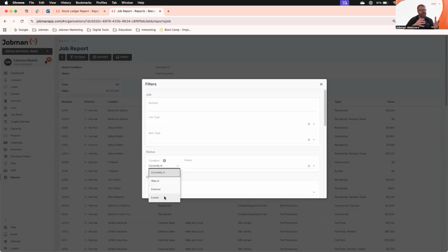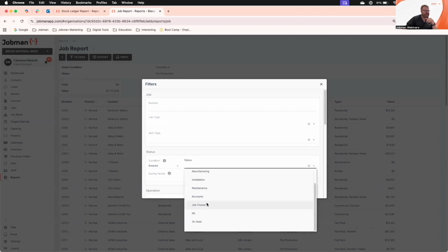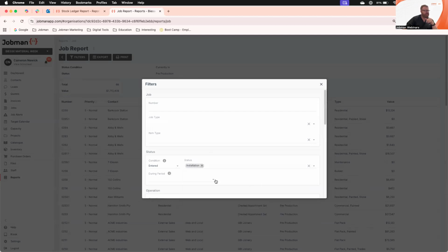So what is the advantage then of conditional statusing? Conditional statusing means I could say, show me all of the jobs that entered the status of installation during this month. So now if I do want to factor in the installation that might not necessarily be complete till October, for example, but I do want to factor that into my September numbers, I can do that. I can see the work in progress. It's more of a current view. So conditional statusing, phenomenal, fantastic feature. Use it. It's really powerful for the way it's going to break the filtration of the reports down.